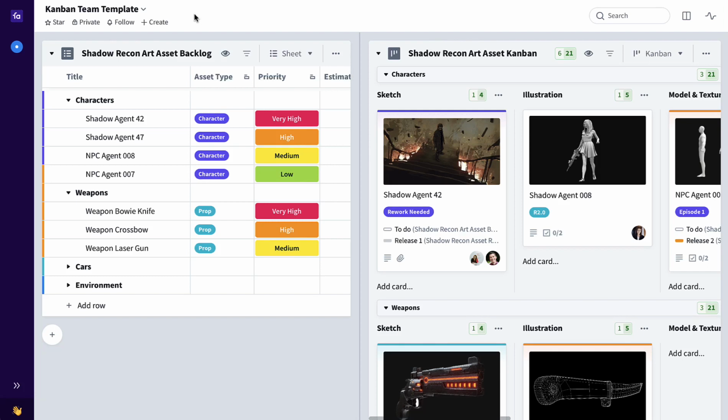Hi, I'm John Leslie. Kanban is an excellent method to handle recurring work with the same repeatable stages. The focus is on finishing and reducing work in progress by pulling work through the flow instead of pushing. When people at a particular stage are ready to take on new work, they pull from the previous stage. Kanban is about visualizing and optimizing the flow of value.